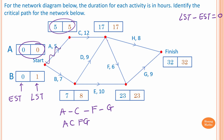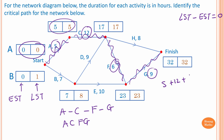Please take note: the critical path helps you find the shortest time to complete the project. In this case, the shortest time is 5 hours plus 12 hours plus 6 hours plus 9 hours, which equals 32 hours. So the shortest time to complete this project is 32 hours.